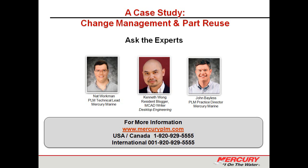So this one is: does the change board authorize funding, or do they need to go to another authorizing committee? If you can talk about the process around that. It's a little bit of both. We will get our authorization for funding at the product approval committee level in a stage-gated process. But once that funding is approved, it's the program manager's job to manage that funding within the budget. So as the change initiator comes into the change board, as a program manager, I can approve the change and take care of the funding through my program budget.